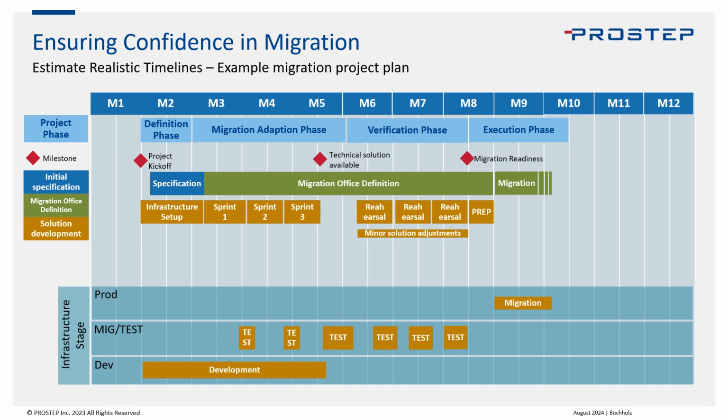At the beginning, you will probably run into a lot of issues with that, but the further into the project, the more confidence you can raise on the business side and on the IT side, always doing a short sprint migration, looking at the data together with everyone, so that everyone sees these are the results that in the end you can work with. Once this sprinting is done, which means all the capabilities that need to be implemented and configured have been implemented, configured, and also validated together with the business, then you go into rehearsal testing.